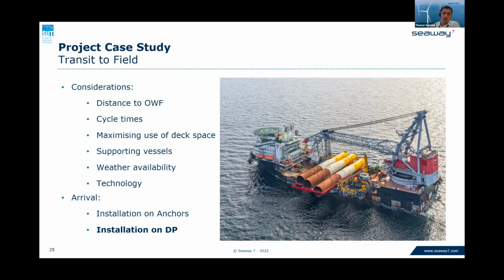On arrival, there's generally two ways of setting up for our vessels just now, and that's installation and positioning on anchors, or now installation on dynamic positioning. And where I mentioned the technology, this has been a big push in the company to basically become a key enabler to bring future wind farms more commercial, by installing on DP and lowering our cycle times significantly.